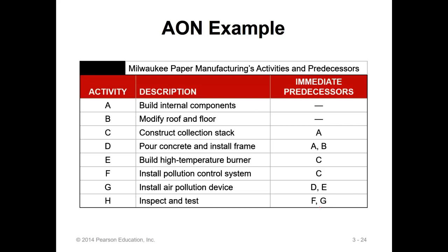So E, you see over here, E has the prerequisite of C, correct? Because C already has a prerequisite, A. That means, even though you didn't see A over here, we understand A must be completed before C can start, correct? Prerequisite. And then A actually is a hidden prerequisite of E, right? Do you see the hidden prerequisite? Some of the classes you see, chemistry is a prerequisite to 2072 materials. But chemistry has a prerequisite of pre-calculus, a hidden prerequisite. Okay.